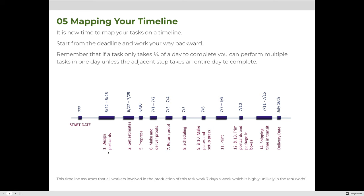Designing the postcards takes five days — June 22nd, 23rd, 24th, 25th, and 26th — which means the client will have to give us the job on June 21st, or at the very latest the morning of June 22nd, for us to be able to get this job done and delivered to Des Moines, Iowa.